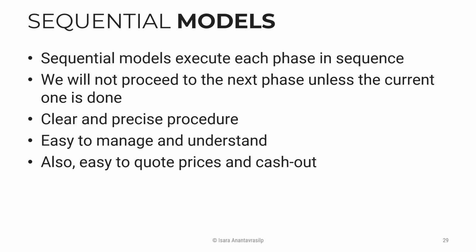And then the customer is going to pay another 40% after you finish implementation, and after you deploy, or after you test and pass all the UAT tests, the user acceptance tests, the customer is going to pay the rest. So it is quite easy for everyone, for the project manager, to decide, okay, I'm done, or I'm not done yet.